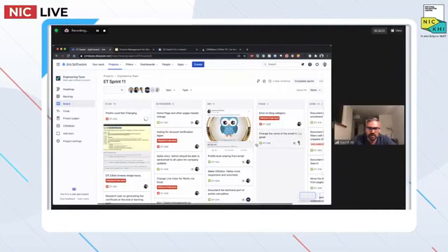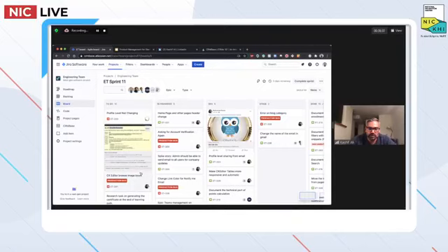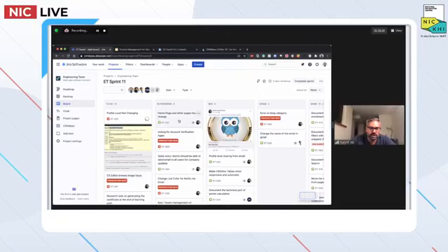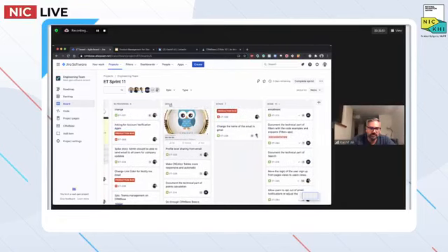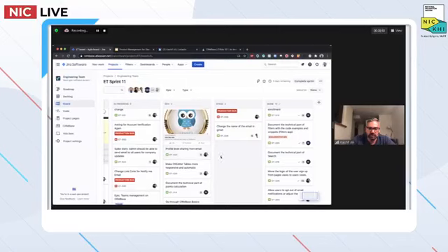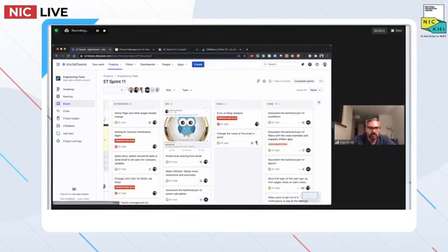This might look somewhat like Trello to you. In the to-do phase, we gather the requirements, and if there are production bugs, we tag them as such. When it's in progress, I know the developers are working on it. When it's in the dev environment, that means we also have a dev and stage environment setup where we test our stuff before deploying it to production, and these two columns correspond to that. Before moving it to done, we have a definition of done: if it's working in production and working as expected, then we close that story. So this is a high-level view of the Jira board.